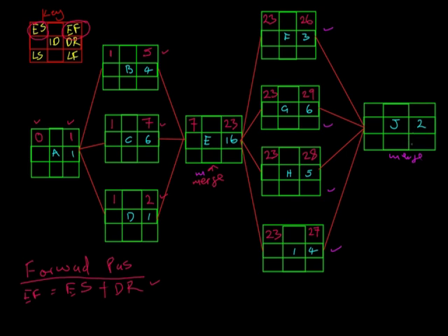All right, so remember we said there is a rule that applies to the first activity. Which one is that? That the early start is equal to 0. Now check what other rules also apply to the last activity. You will see it here. So first of all, we do the normal thing. What is the normal thing? We need the early start of this activity, but there is more than one activity before it. We actually have 4 activities before J.